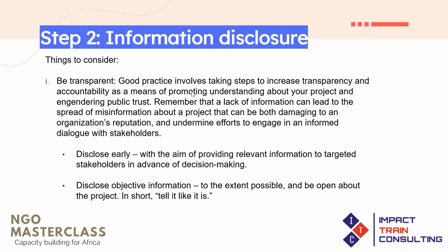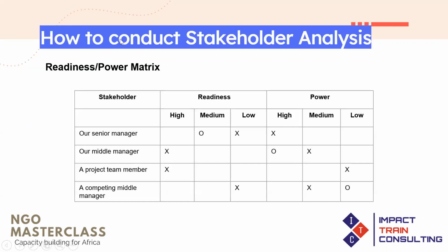Like somebody has said in the chat here, stakeholders' interests do change with time. So these documents have to be updated. At different stages of the project, stakeholders' interests may be different, and you may have new stakeholders coming in. Some stakeholders that you thought were there at the initial stage may no longer be there, especially with government agencies where they have a life cycle or a high turnover. Government is always transferring. Elected officials have a 4-year cycle, or a 3-year cycle if you're in the local government, and so on. So you know that a new set of stakeholders are going to come, and they may have a different interest, and their interests are going to change as well.